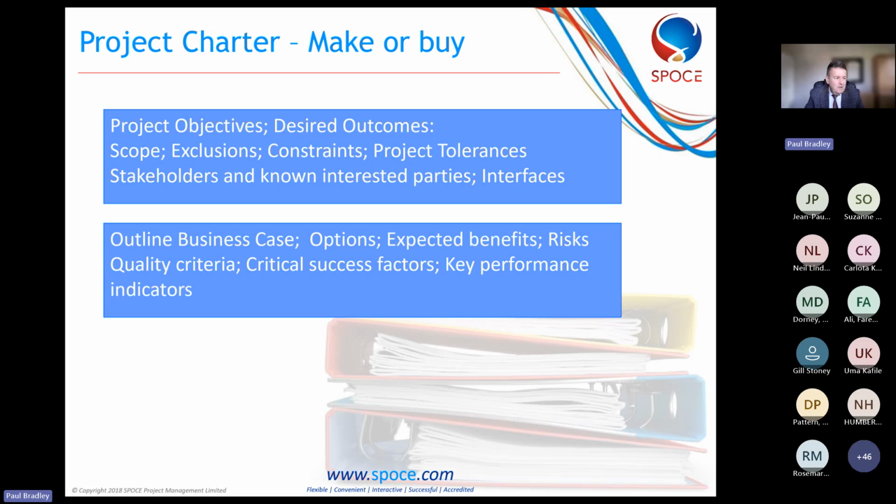We're going to look at performance, progress and forecasting tomorrow, actually, in the Let's Dance session. But at this point, we're establishing what those critical success factors are. And the way to monitor progress against those is to put in various milestones. Each of those milestones may be a significant delivery point and produce a KPI, key performance indicator, to say, look, if we get this far, this is what we should have achieved so far. And if we've achieved this so far, then we are on track to meeting those critical success factors.